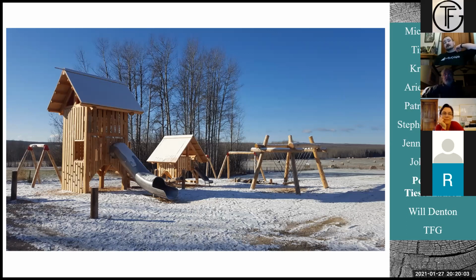And the end result is 3 months of construction, just me and Lance, and the odd occasional helper here and there. It's all done with approvals and all that stuff. It's all safety rated. And the overall cost of this project was about 85,000 Canadian, which people are saying should be around 250,000 or something. So we're pretty proud of that, and we think it should last.